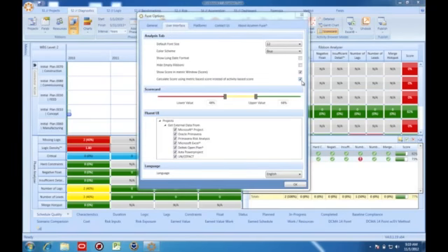Above everything else, the most important decision to make when you're outlining a scoring strategy is the selection of activity-based scoring or metric-based scoring. As you saw in this demonstration, when I changed the scoring type, there was a significant difference in the way that scoring was computed and in the final result. Activity-based scoring places a premium on absolute compliance with the assigned metrics. The breach of any single metric on a task will prevent those tasks from receiving a passing grade. Metric-based scoring allows incremental improvements to tasks to be reflected in the overall score.